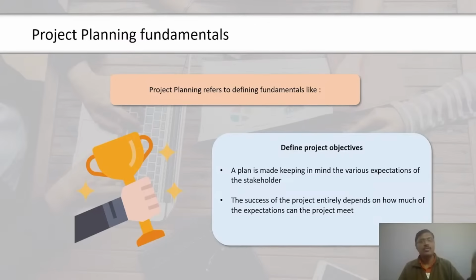Another one we have is the critical chain method. Critical activities which are essential for accomplishing the required results have to be looked at very carefully. If something delays there, it will delay the project. So the critical path method is a crucial tool for determining the progress of the project, so that the project is on schedule. The longest path, and a delay in the critical path will delay the project. Similarly, we have the PERT chart. PERT refers to Program Evaluation Review Technique.